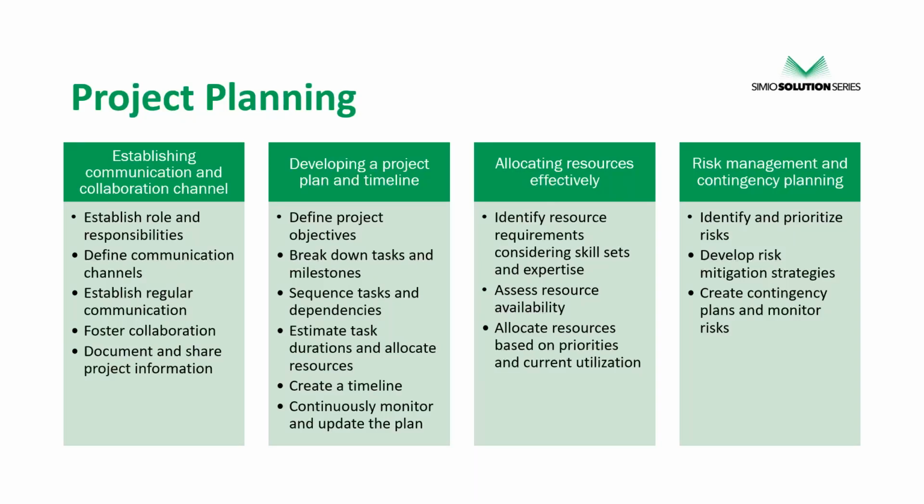So starting with even just your statement of work document, having that shared with all the stakeholders, having them engaged with it, and providing feedback on what should be included there. But then as you go forward, having ways for decisions that were made to be documented and available for all the stakeholders to go back to as well. So that's really the first piece. Understanding who's going to be involved and how you all are going to work together is a critical piece for the project scope.